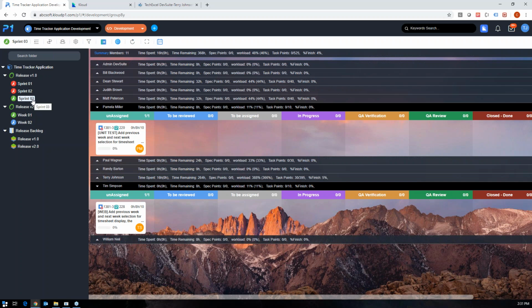We have a duration for the sprint. All we have to indicate for any individual is how many hours, or what's their capacity for the sprint. So if they're working 100%, then, well, it's real easy. 8 hours per day, right? Then you would have 40 hours,